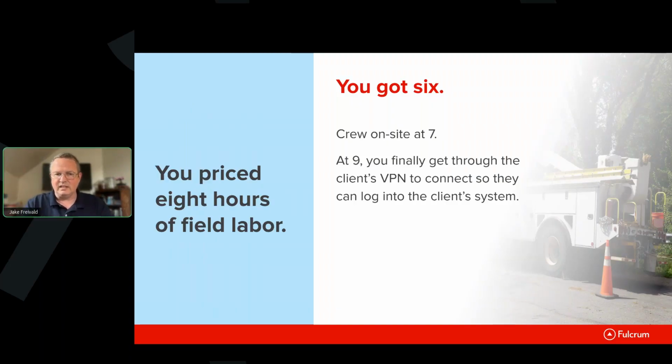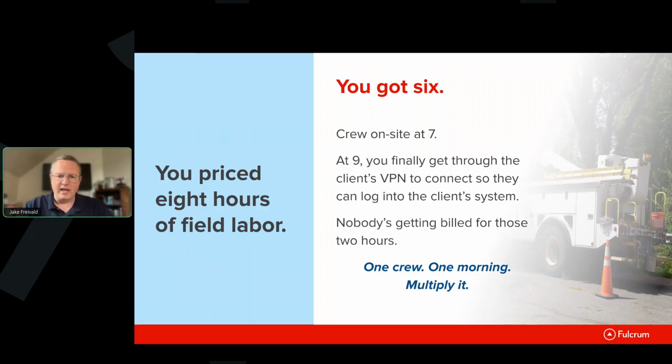Because of that delay, because of that problem with actually making the connection, there were 2 hours worth of field labor that were being billed to the company. The company had to pay its employees, but nobody was getting billed downstream to help account for those 2 hours. Take that one truck that this one person was working on and multiply that by the number of crews and the number of mornings that this happened, and you start to see the scope of the problem.